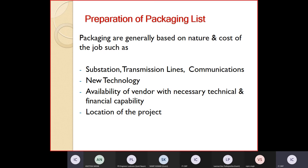Generally, packaging is done based on the nature and cost of the job. There may be a substation package, a transmission line package, and some communication equipment packages, depending on the volume of work and the substation. There are probable parties available in the market, so we don't give everything to somebody who is not capable of handling both the substation and the line. But if there are agencies who can handle all things, that will also be considered.